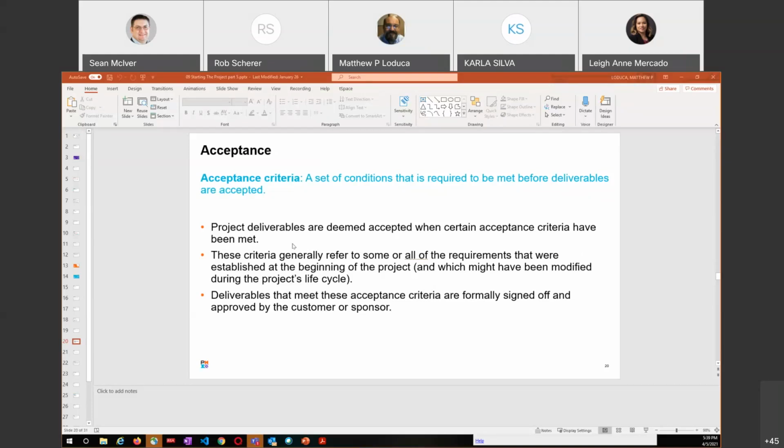So acceptance: we identified what's acceptable, we demonstrate to them that it is what they asked for and it meets these criteria, and everybody signs off. And so we're all copacetic. The contract has been fulfilled. Any questions on this? Acceptance is pretty simple stuff. I guess it's simple in theory, but in real life it gets complicated, generally because acceptance criteria may not have been properly defined, and so there's wiggle room. Without that wiggle room, it usually is pretty cut and dry.